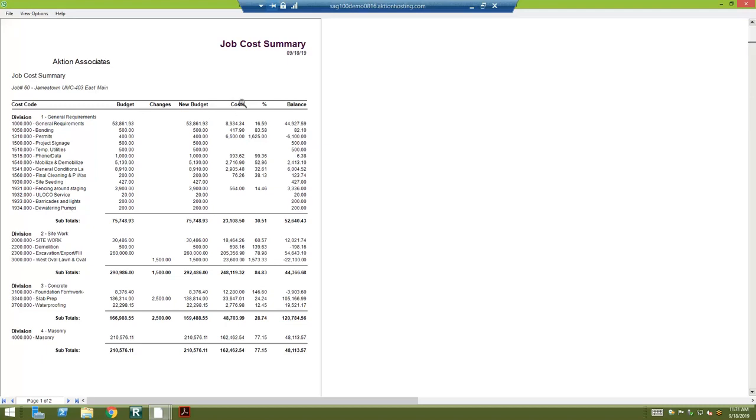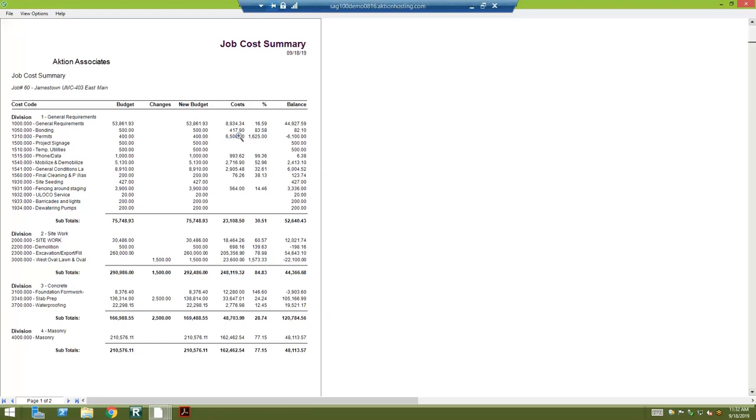Then the costs in that cost column are going to be any accounts payable invoices that were entered. So when you enter an accounts payable invoice, let's say it was for permits, you would enter job 60, then permits, and that's how it's going to come into that particular line item.